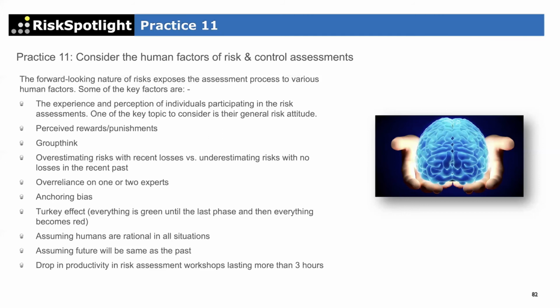Similarly, if there are other risks which have not happened for a long time and those are on your risk register, you may want to consider that the people doing those risk assessments are underestimating the likelihood and the impact, and you may want to validate the assumptions or the data they are using to come up with their assessment.